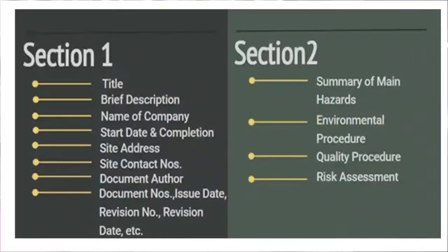Now this title must also have a specific place of the activity, in case the same activity is being carried out in different places, with different acceptance criteria or different specifications.